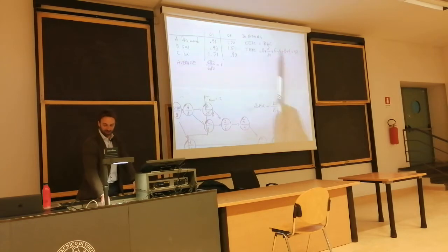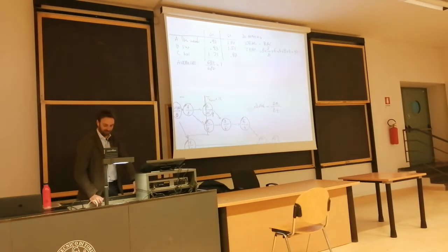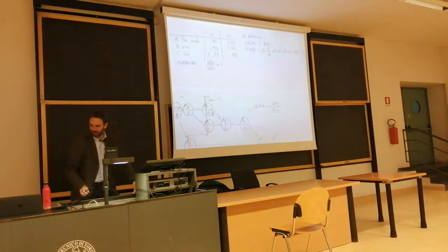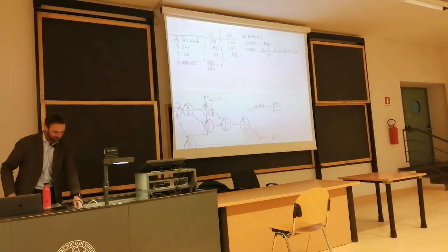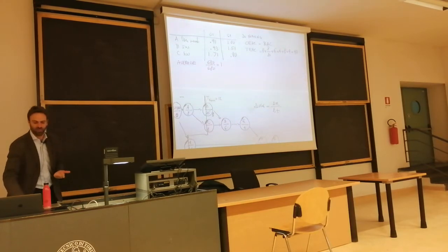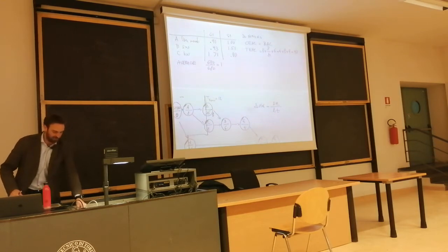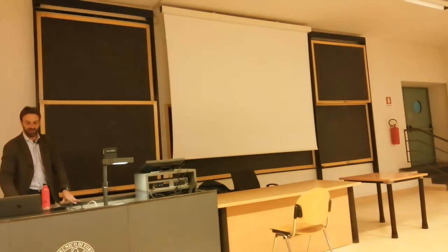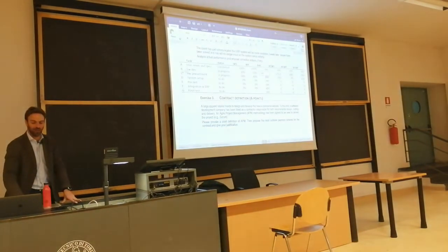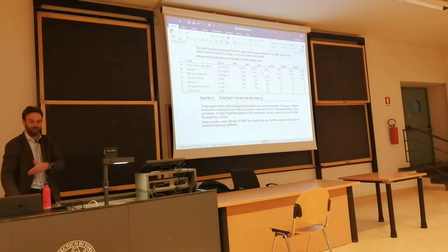We should have gone with an original approach with the duration of all those tasks, because the hardware is a different task than all remaining tasks. This is procuring hardware, which is different from doing software development and testing. So I don't think that because we are late on the hardware, we're going to be late on other tasks that we were on time.